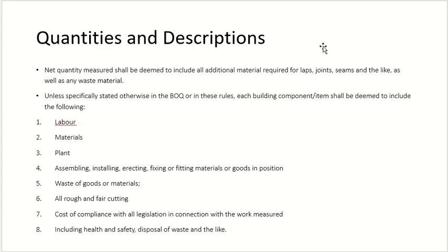Okay, and the quantity will be measured in what units? Anybody has any idea? For flooring, what are the units of quantity? Area. Okay, so you will give me the area. I need glazed tiles on 24 square meters of area.